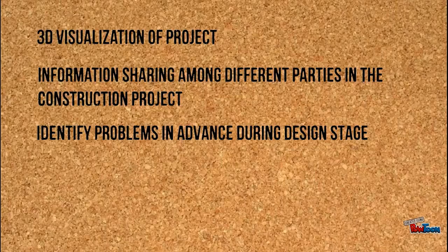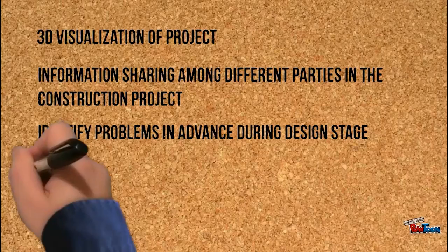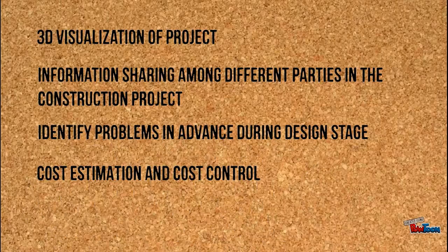By constructing the BIM models, we can simulate the buildings in reality and identify problems like crashing of the pipes in advance. Furthermore, the BIM model can be used for cost estimation and cost control. Once the model is designed, we can then insert the unit cost for different elements and estimate the total project cost. The estimated total cost can then be used for cost controlling so that the project will not be over